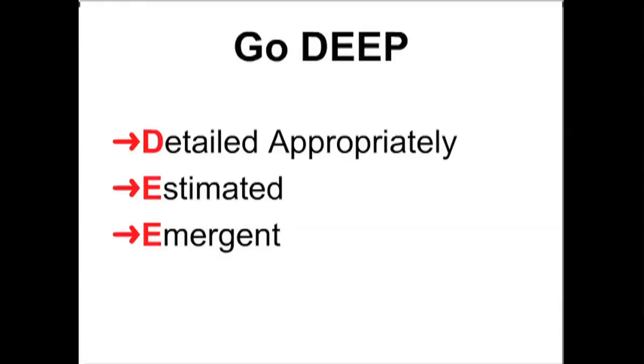any of those changes. Now, just a thought on that, because you might say, well, if things are emerging and changing, that could cause problems for the team. Every 2 weeks, we commit to doing X number of user stories, and that becomes our sprint backlog. And during that time, we don't change what has been committed to. It's only during our planning session that we allow new items, new priorities to emerge for us, and then we can commit to those.